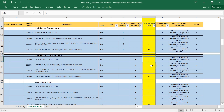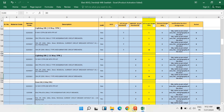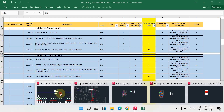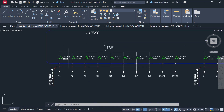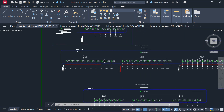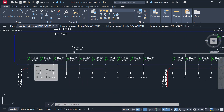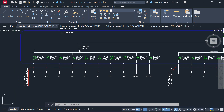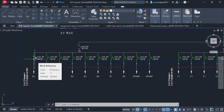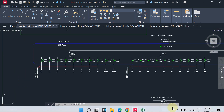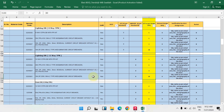The 40-amp double pole RCCB quantity is 3. For the 10-amp single pole MCB in the 12-way TPN DB, open the SLD: 1, 2, 3, 4, 5, 6, 7, 8, 9, 10 — ten here, ten here, ten here — total 30. I have written 30 for the 10-amp single pole MCB.